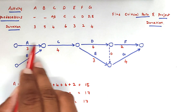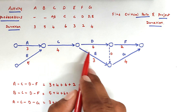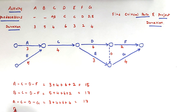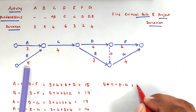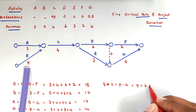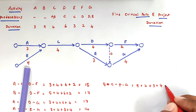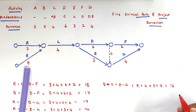Path A, C, E, G has a duration of 3 plus 4 plus 3 plus 4, which equals 14. Then path B, C, E, G has a duration of 5 plus 4 plus 3 plus 4, which equals 16.